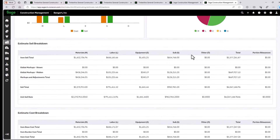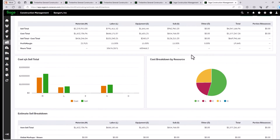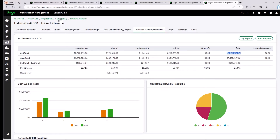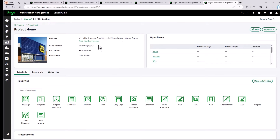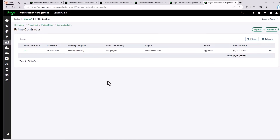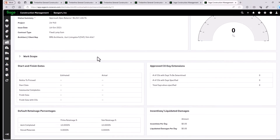There are other views where we can get into the details, but I'm just looking at the big picture. Our cost estimate is 3.3, and our overall schedule values is going to be a little over $4 million. So let's go back and take a quick look at the prime contract that we have set up, otherwise known as our schedule values.